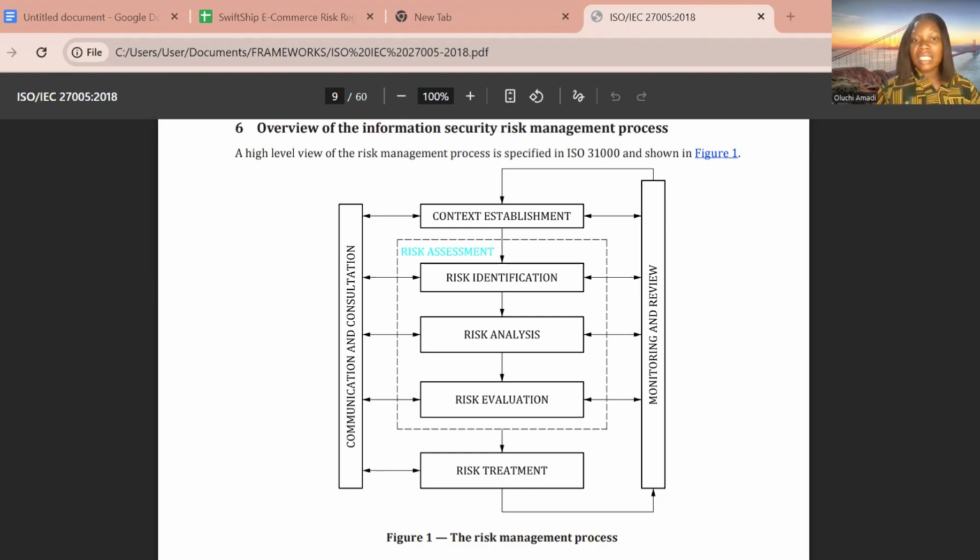The qualitative risk analysis answers the question, which risks are the most important? It is the most common approach that people use, and they normally use likelihood and impact. They use low, medium, high, or numeric expressions like 1, 2, 3 to count it. That's the most common one that most small businesses use. Whereas the quantitative risk analysis answers the question, what is the actual numerical impact? They want to know, if this thing happens, what will it destroy? That is the difference between the two of them.